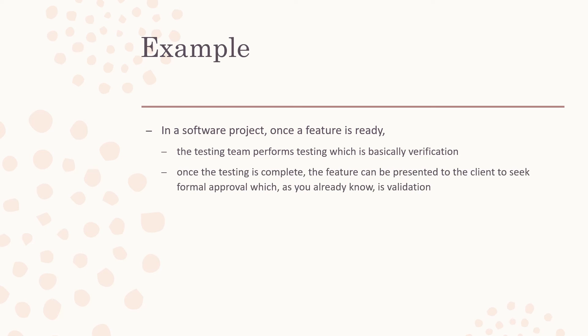Once the testing is complete, the feature can be presented to the client, and you seek their formal approval — that is validation, the Validate Scope process. So here's the difference: when your code is ready and testing is being done, that process is verification. Once testing is complete, you present the code to the client and obtain their approval — that is validation. Verified code and validated code are the two distinct outcomes.